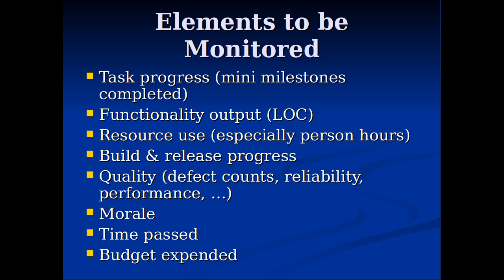As I've emphasized before, it's really important to be clear about what 'done' means. Is it 'done done'? Or are you just saying the code is written but you still have to compile it? Task progress is going to be really important. Tracking lines of code is sometimes a good thing just to figure out roughly where you're at. I'm asking you to estimate how long you put in — but more than that, to estimate how long you think a task will take versus how long it actually takes. I am not going to penalize that at all — it's a great opportunity for learning.